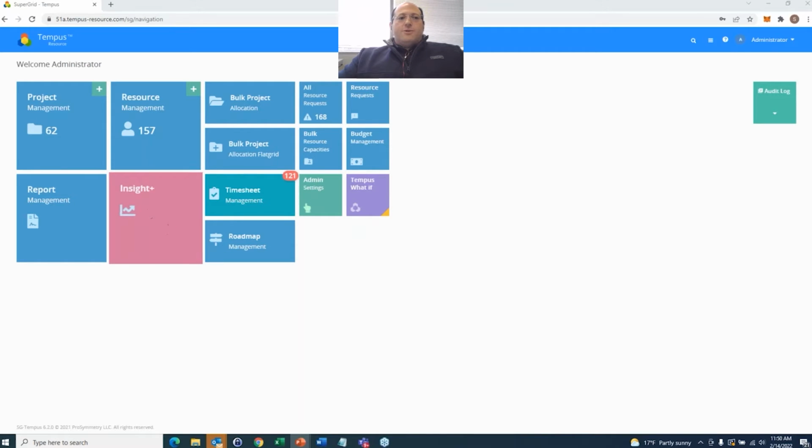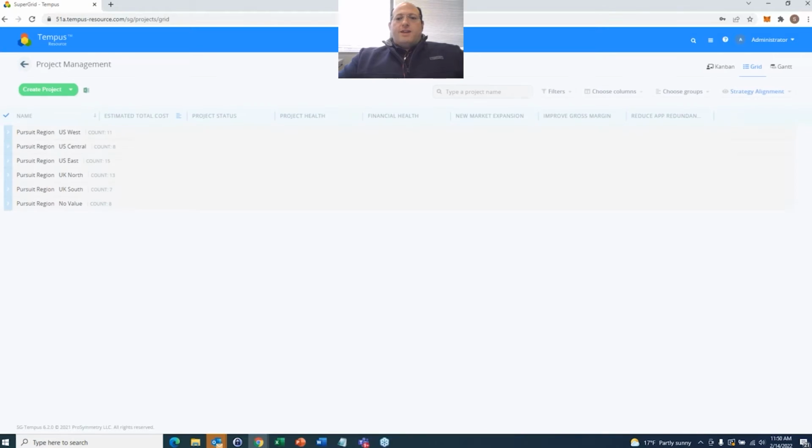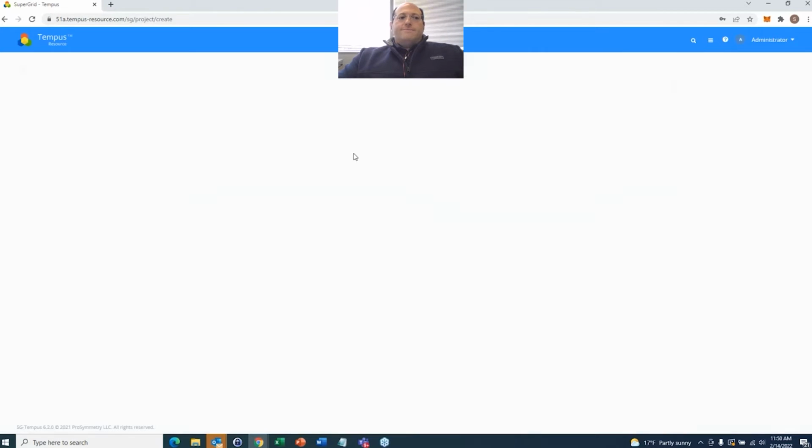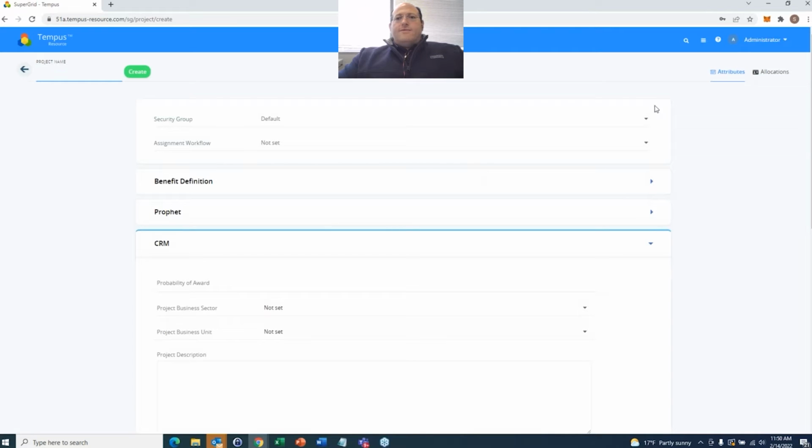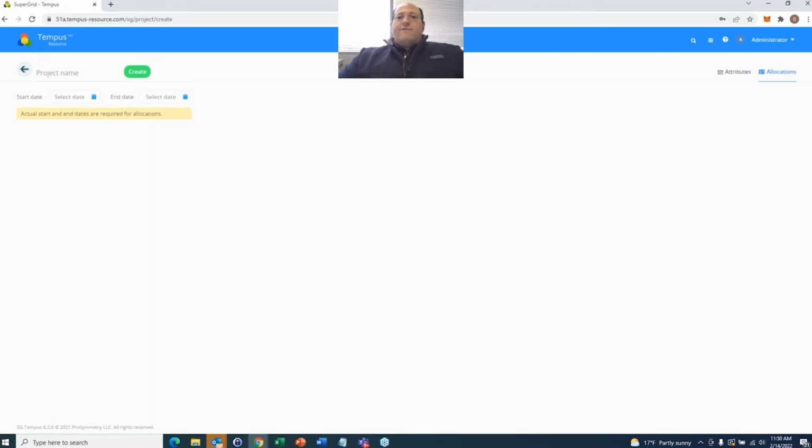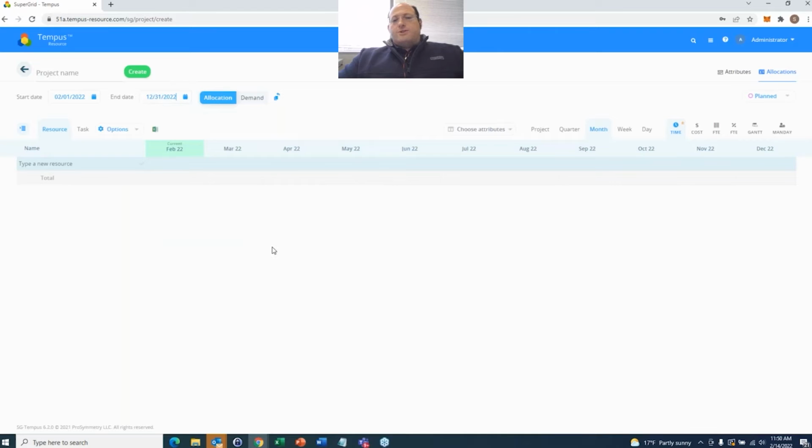So from the Tempus homepage, we're going to browse to the project management tile. And in this case, we'll create an entirely new project. Now from the allocations tab inside of your project, we're going to first set a start and finish date for the project. Of course, these can change over time, but we need this in order to build our forecast. And let's assume we want to start February 1st of 2022, and we'll maybe go until the end of the year. So we've set the time frame for our project.